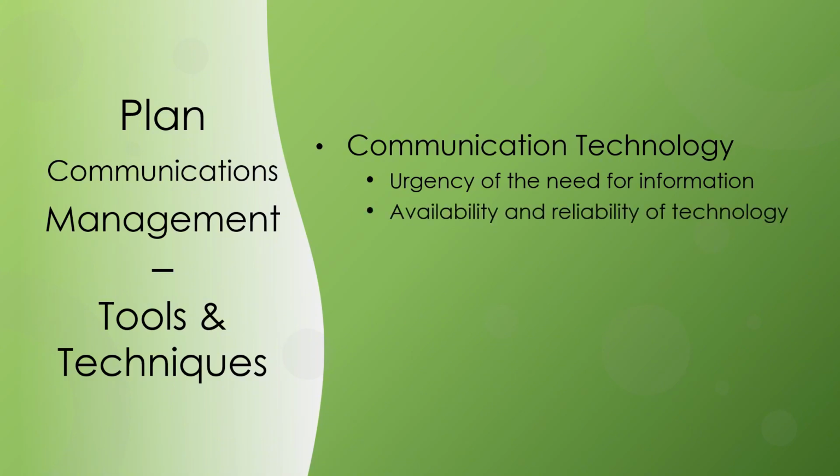Availability and reliability of technology. The technology that is required for distribution of project communications artifacts should be compatible, available, and accessible for all stakeholders throughout the project. Ease of use. The choice of communication technologies should be suitable for project participants, and proper training events should be planned where appropriate.